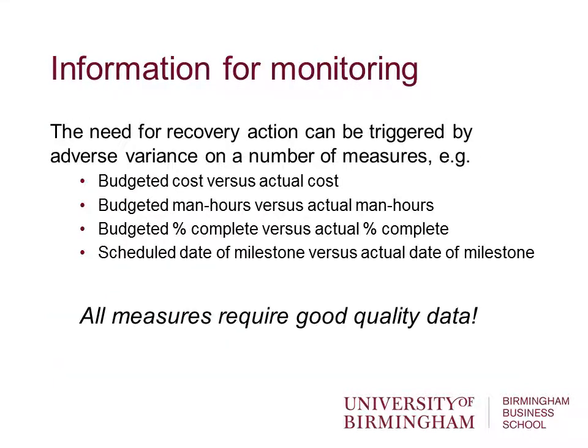Sort of data you might collect: budgetary cost versus actual cost. How much we plan to spend versus how much we've actually spent. People hours, again budgeted against actual expenditure. Budgeted percentage of the project, or the activities within the project, being completed, compared with the actual percentage completed over a given period of time, and scheduled date of milestones against the actual time when the milestone is achieved.